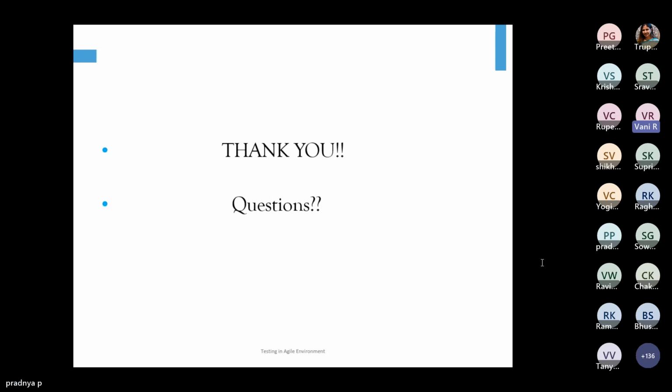So this is one of the concepts I got to know, like involving one set of testers into the development team. That is informative. Right, so continuously they are engaging and we are having total clarity about the requirements and we can contribute. That's why, if we have 5 people in testing team, at least let 2 people be part of sitting with the development team and involved in the small story testing, which is only in that iteration.